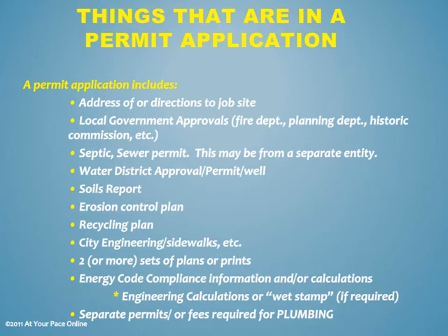Soils report. Erosion control plan. Recycling plan. City engineering, sidewalks, etc. Two or more sets of plans or prints. Energy code compliance information and/or calculations. Engineering calculations or wet stamp if required. Separate permits or fees required for plumbing.